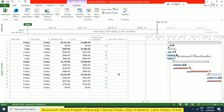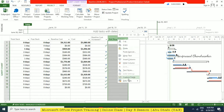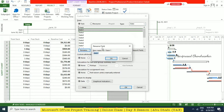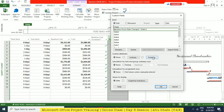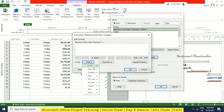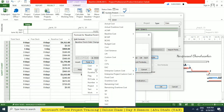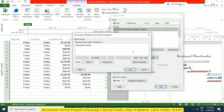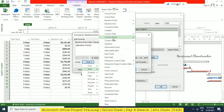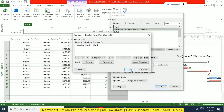Now I'm going for customizing the field — go to Custom Fields, and then I'm going for Date type. I'm going for Rename, and then I'll call it 'Baseline Finish Date Change.' Then click OK. Now we can go for Formula. We need to put the baseline finish date. So from Field, go to Date, then Baseline Finish. We also have Finish 1 — we can put Finish 1. Click OK, and then click OK again.